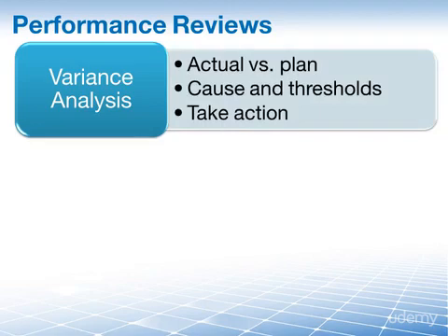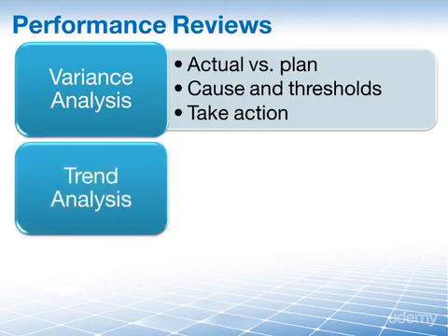Now you can go ahead and analyze the variance. What is the cause of the variance? Is the variance greater than any of the thresholds that we have defined? Do we need to take any corrective or preventive action? Note that your influence over variances is greatest at the beginning of the project and diminishes as you get towards the end. Second, you will perform a trend analysis.